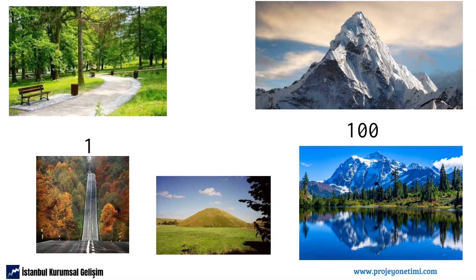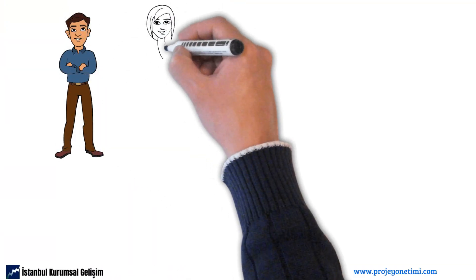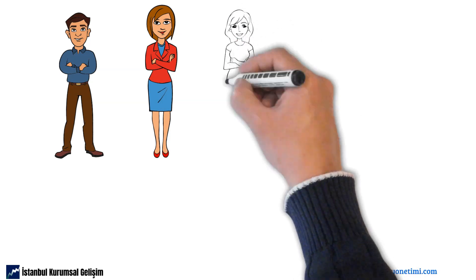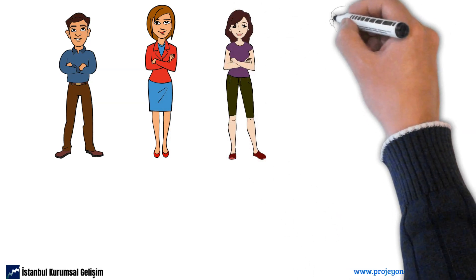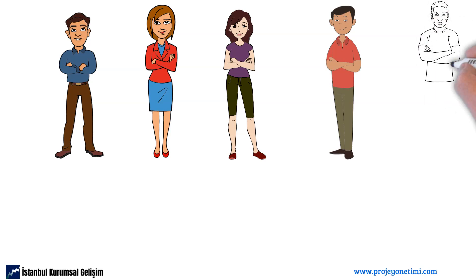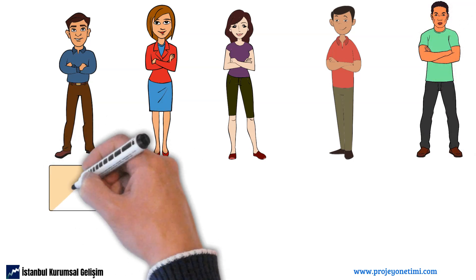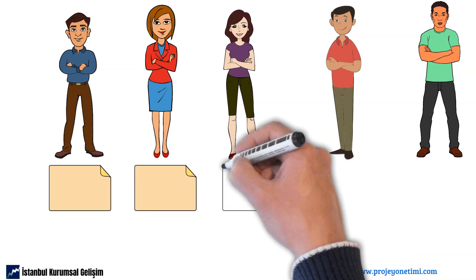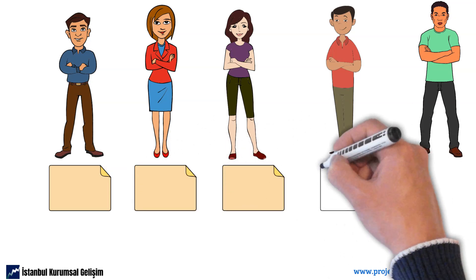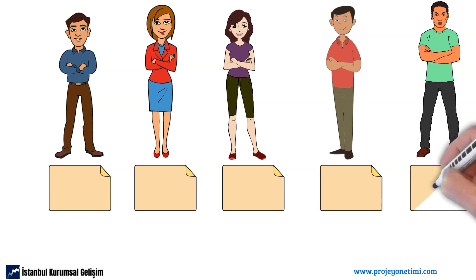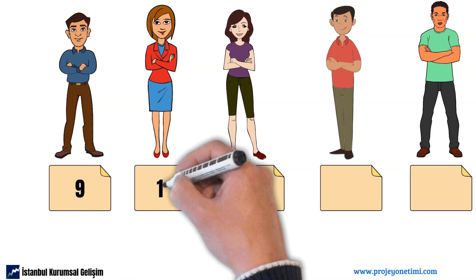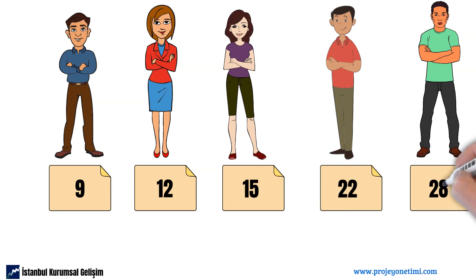There is no right or wrong with the numbers given during estimation. Each team member makes an estimate considering the difficulty and complexity of the job for themselves. Team members write their predictions for the item — preparing the starting page — independently on a piece of paper and show it to each other at the same time. The aim here is to ensure that they are not influenced by each other and that each makes an independent guess. For example, let them write numbers as 9, 12, 15, 22, 28.